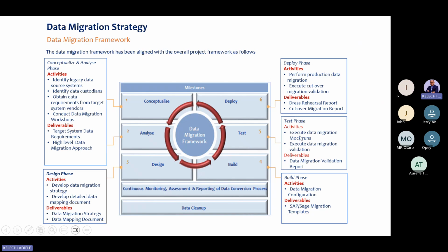After we have done the data migration configuration, the next stage is to test. You have to go into the system and make sure the data you uploaded has come, so execute a data migration mock run and execute data migration validation. You have to make sure that in your QA or development environment you have tested it, the data has come, and all the information you've uploaded is correct. And of course, you have to make sure that somebody validates that.